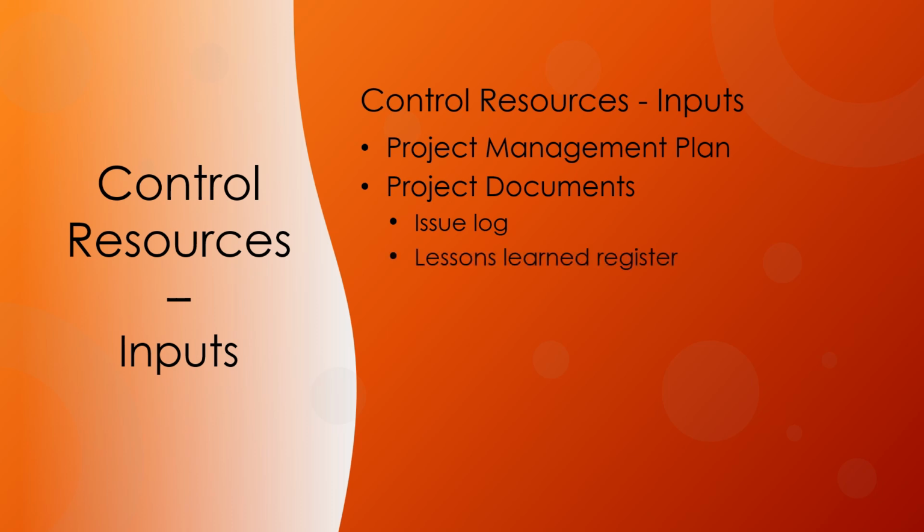Lessons learned register. Lessons learned earlier in the project can be applied to later phases in the project to improve physical resource control. Physical resource assignments. The physical resource assignments describe the expected resource utilization along with details such as type, amount, location, and whether the resource is internal to the organization or outsourced. Project schedule. The project schedule shows the resources that are needed, when they are needed, and the location where they are needed.